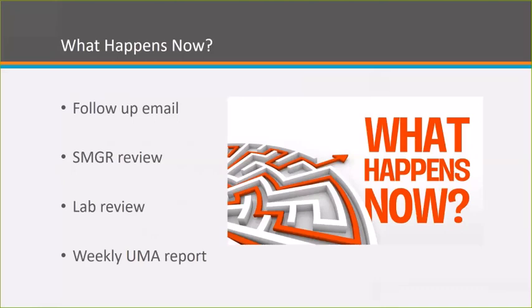Why is that important? Well, the lab that should be identified on your test tab is the lab that corresponds with the responsible lab on your required documents list. So if you're submitting a steel item, that's material that's going to be evaluated by the physical test lab. If you're submitting an aggregate item, that's a material that's going to be evaluated by our ag lab. So it's important that you direct the sample records to the appropriate lab, so that the lab can get their notification that this is awaiting their evaluation.